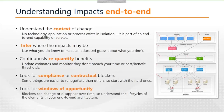Going back to our cost chart, it's very important to keep regenerating and re-quantifying those benefits. In the death-by-a-thousand-cuts scenario, you need to understand when your benefits case is starting not to make sense anymore — that means continually being able to remodel those benefits. For the kind of showstoppers, there's no guaranteed way to identify them, but a useful rule of thumb is to look for the things you can't renegotiate. Internal dependencies can often be renegotiated within your own organisation, but compliance or contractual blockers with third-party organisations or regulators are much harder. So it's good practice to start with the things which are going to be hard to move and just check whether your road map is likely to hit any of them.